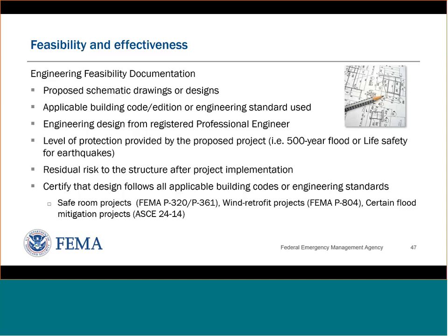We want to make sure that the engineering design is from a registered professional engineer, and how we determine that is any sort of engineering documentation should have the engineer's stamp on it, which indicates they are a registered professional engineer.